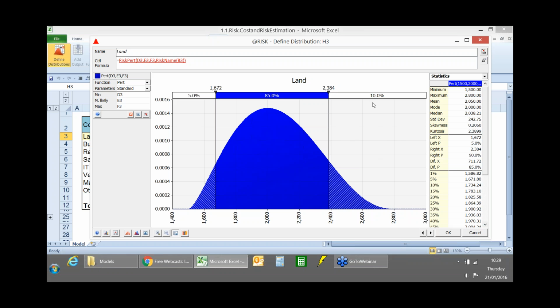If I wanted to be more conservative, I might choose the P95, in which case I'd put 2469 into the budget for land. If I was not averse to taking risks and didn't need quite as much confidence, I might choose, let's say, the P75, in which case I'll put in 2224 for land. I'm going to come back to this idea of confidence levels a little bit more when I talk about the outputs from a distribution. But that's what the software is doing. It's generating samples over and over again and putting them back into Excel.